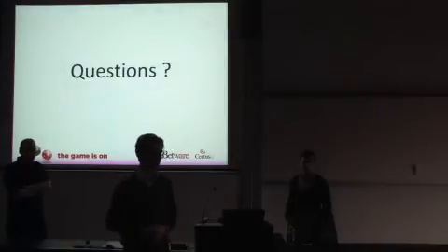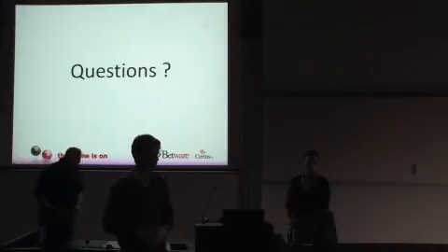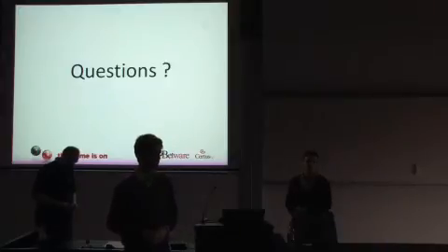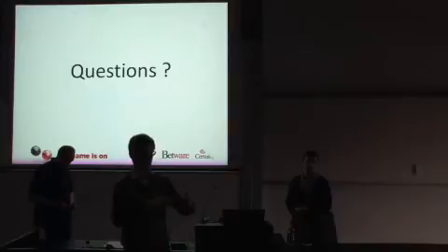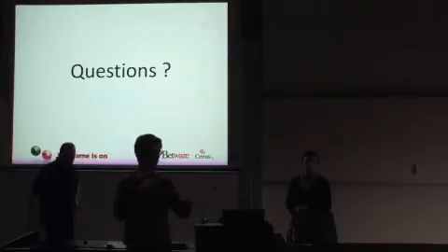Yeah. But sometimes there's uncertainty, right? And so inevitably your sprint plan will involve a little bit of speccing out or further detail on a story. Right. The backlog has different levels of uncertainty. At the top, you have much less uncertainty. At the bottom, you have more.